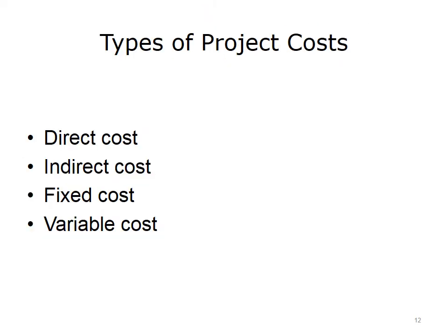The project team must ensure that they have identified all project-related costs. Costs can be variable or fixed, direct or indirect. Costs directly related to the work of a project and directly benefiting the project are direct costs. Examples: equipment, salaries, travel, materials, labor.